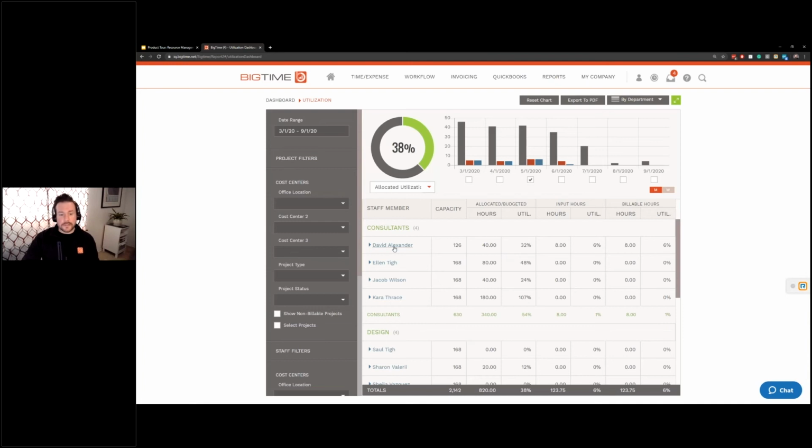So of our consultants, David had the capacity to work 126 hours for us. We only assigned him 40, severely underutilized. I've got to do some better prep in this account to make this look like a shining example of what to do. Until then, use this as an example of what not to do. But he's 32% utilized based off of my planned workload.